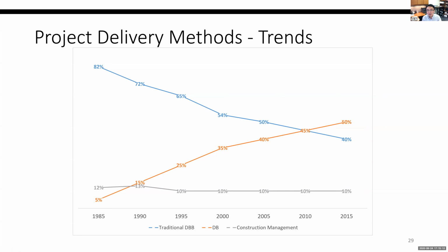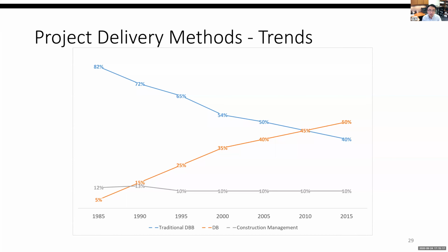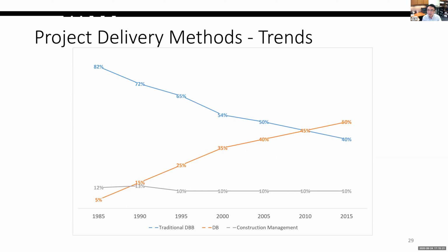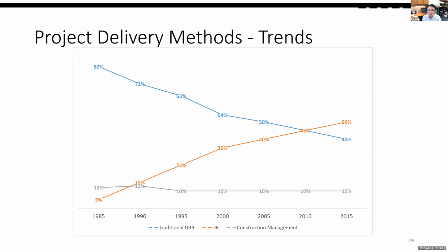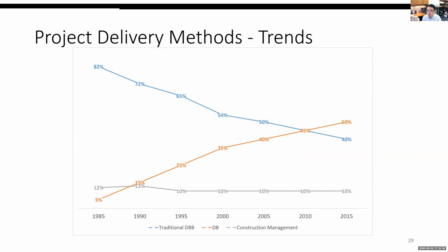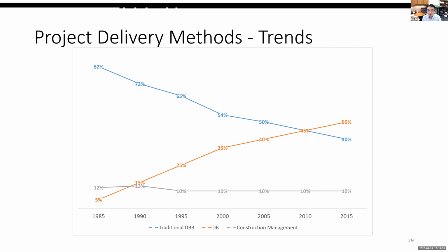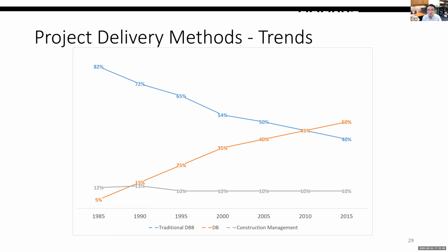Just want to share something with you guys. Actually, in some companies I worked for before, they have something called zero budgeting. Anybody has heard about that? It's called zero budgeting. Nobody? Zero budgeting means, for example, during the bidding process, I told the owner I submitted the bid for $10 million. And when I started to build things, I found, oh, actually, I would only spend $7 million. So how about the $3 million?